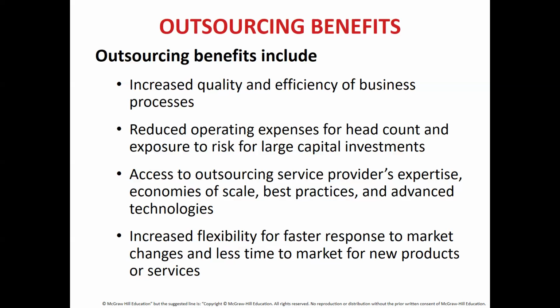You have no one to fire except for the staff that you've hired. Apart from that, if you're doing it through outsourcing organizations, you can get the entire set of money back. Moreover, with offshore outsourcing, work is generally done in phases. So you disburse the amount in phases.